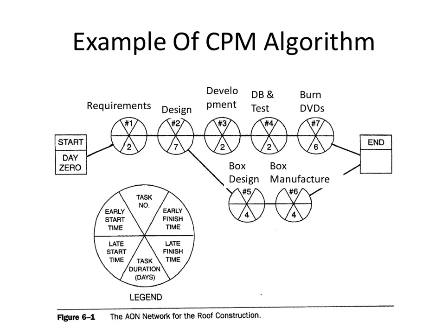Okay, so those nodes which are associated with equal late finish and early finish, late start and early start are said to have 0 float, 0 slack, 0 give, 0 butter zone, 0 buffer. I like it.